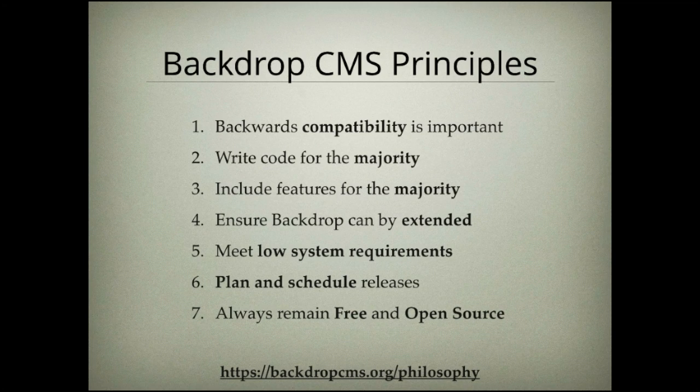And planning and scheduling releases, that's also, when is Drupal 8 out? When it's ready. When is Backdrop out? Well, we'll talk about this later, but we are specifically sticking to having deadlines of when things will be done, and we're going to release on those deadlines. And we're going to measure, okay, this is what's planned in the next release, and we're going to work towards those things. So we're going to have a curated list of things that we think is important, and we're going to get them done. If they aren't done on time, that's fine. We'll ship anyway, and we'll do them in the next release. We'll talk about that more later.